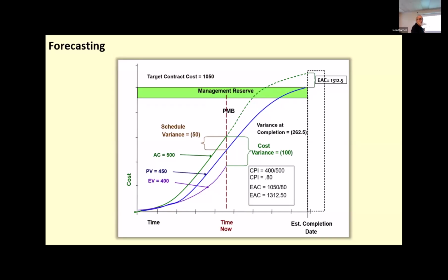But at this project, you go in there and you say, well, okay, we got all these change requests. Is that intended scope? And then, yes, we can build that in. And then we might want to rebaseline the project. But really not very often that you would want to rebaseline it. Most projects will continue with that, and they'll have like a report that shows the addition, what this additional cost is.